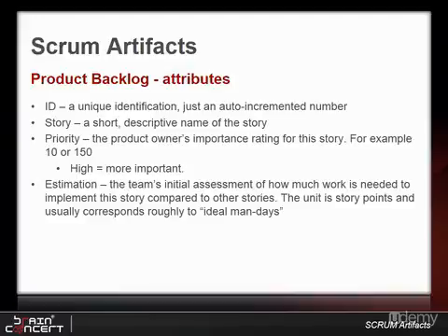4. Estimation. Ask the team how many members and after how many days will come out with a finished, demonstrable, testable, releasable implementation. All of these words mean definition of done. If the answer is with 3 guys locked into a room it will take approximately 4 days, then the initial estimate is 12 story points.